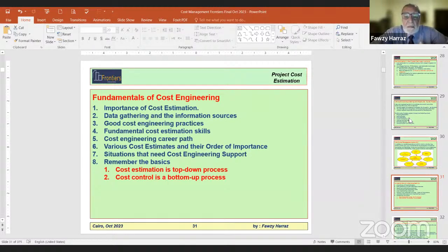We need strong communication skills, and for sure we need quality skills about the software, about Excel, and some of us, maybe senior estimators, will have some skills on quantitative risk assessment software like PERT Master, so that they run or participate in the contingency assessment. Part of the estimate is the contingency, how much we need to cover the risks of the project. Is it 10%, 15%, whatever? This is what we get through running a quantitative risk assessment workshop.